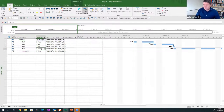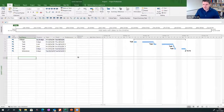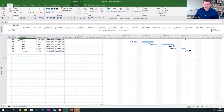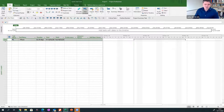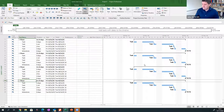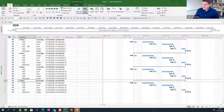I'll change that three-month value to two days and fill out this Gantt chart quickly. A handy trick: if you're planning something like a six-story building fit-out where floors two through five are similar, you can close down the phase, click on the row number, Ctrl+C, and Ctrl+V three more times — and now I've got four phases in MS Project running in parallel. The names appear on every single activity.